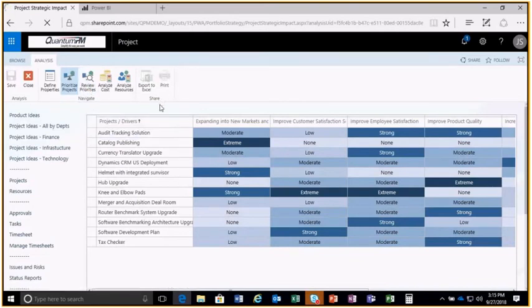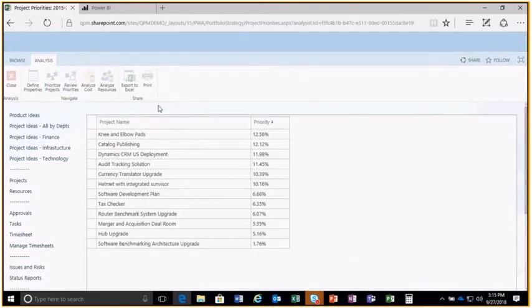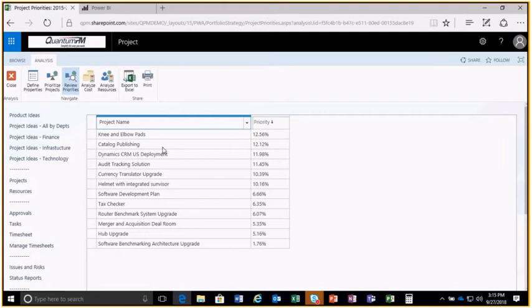And then you get the review priority side of this, which is really about the overall calculation of what the projects are from a value perspective. So what the tool does is, if you aggregate all this, it comes out to 100. It says, based on the scoring of the project and the schema that I'm using, there's nonlinear scoring. Remember we talked about the CIO prioritization, where some of the drivers might have more weight than others. This is the numeric value that's associated with it.